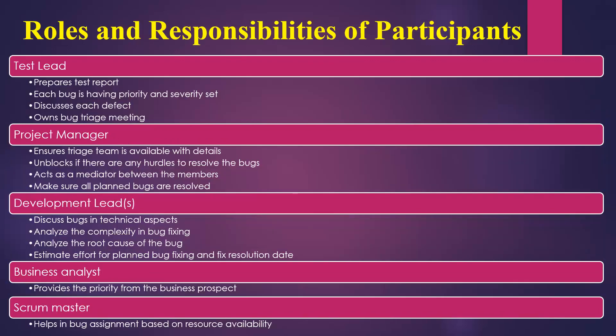Roles and responsibilities of the triage team: The test lead is responsible for preparing a test report before the meeting begins. Each bug should have a priority and severity assigned. When the meeting begins, the test lead initiates the discussion, presenting bugs starting from the most severe ones. The test lead is the key person in this meeting and contributes the major share of the discussion.